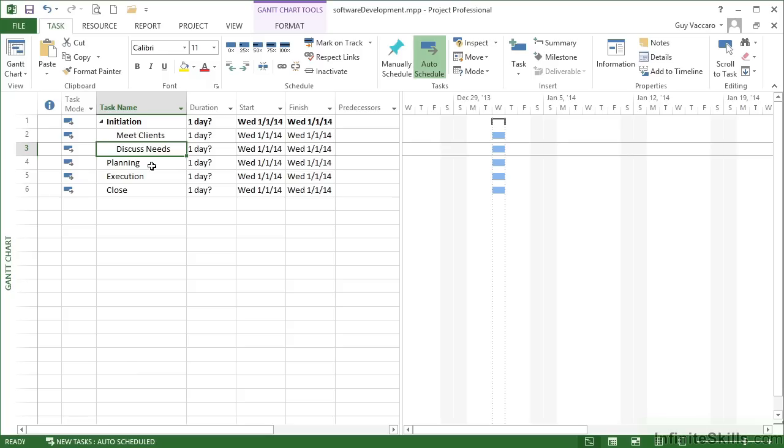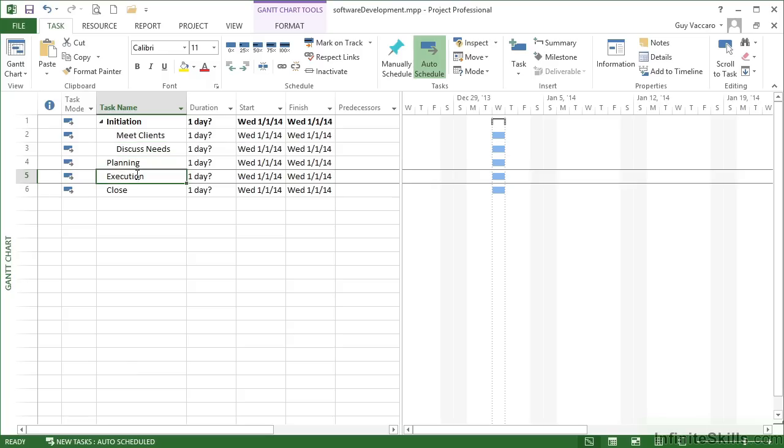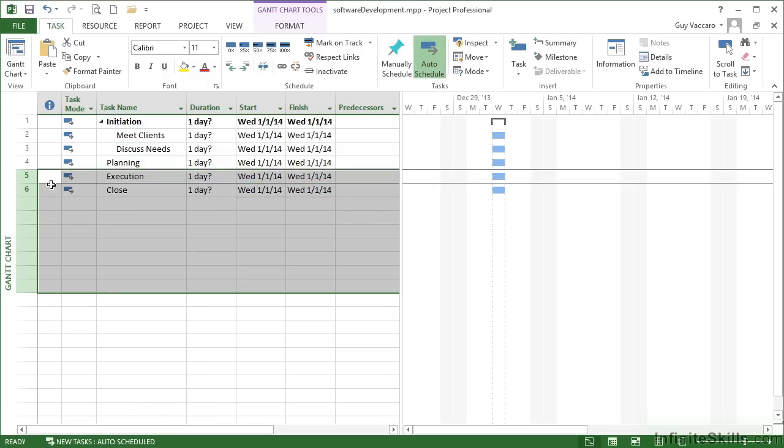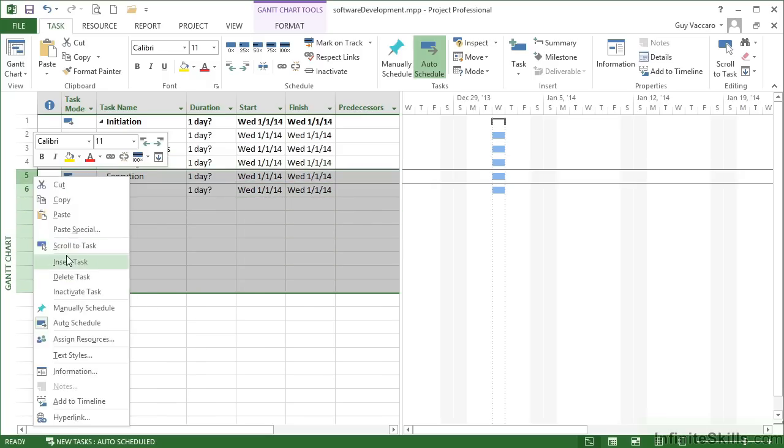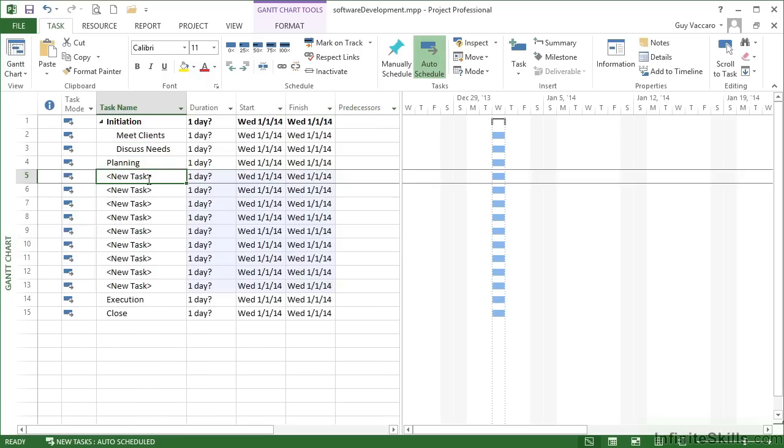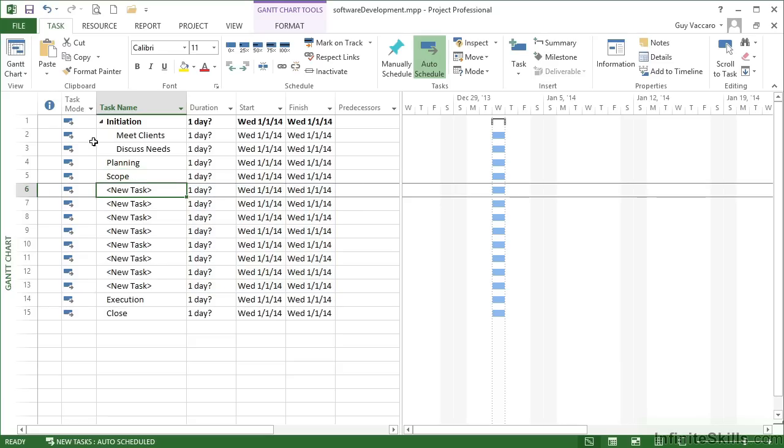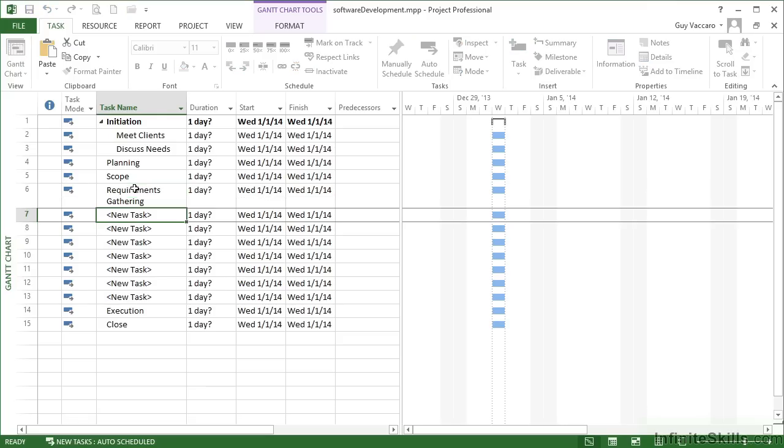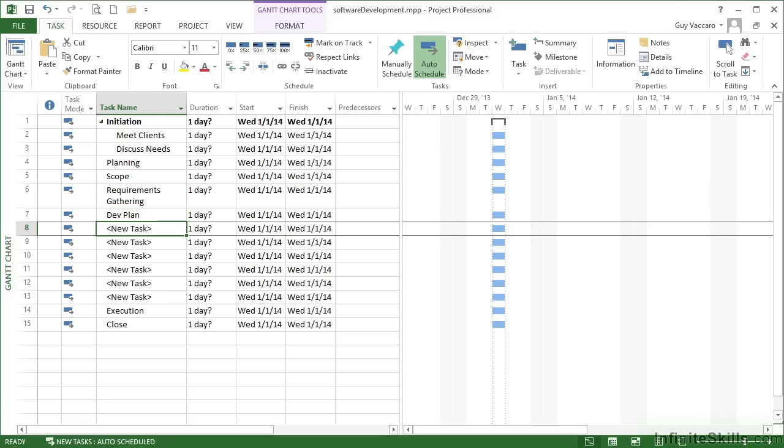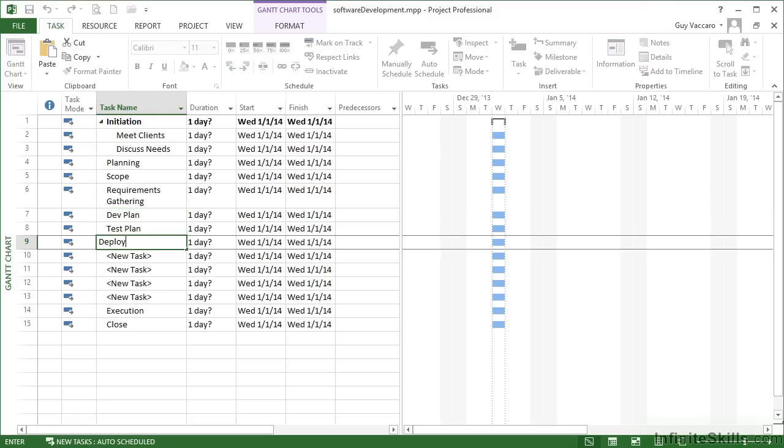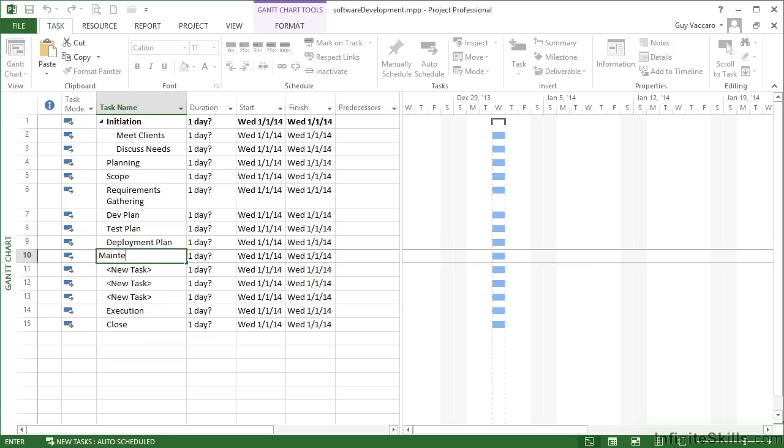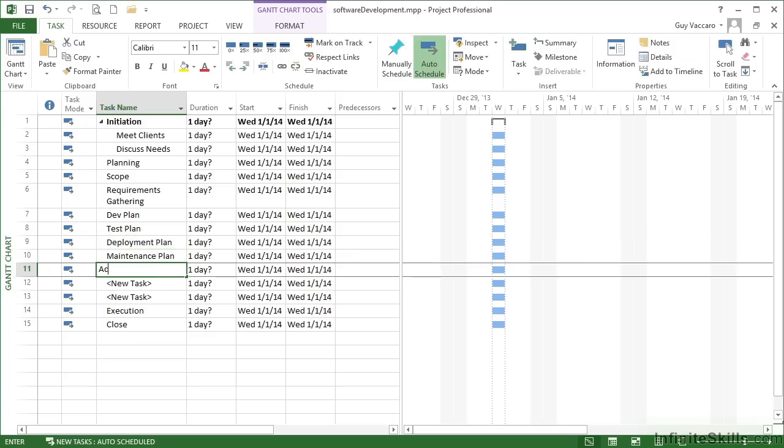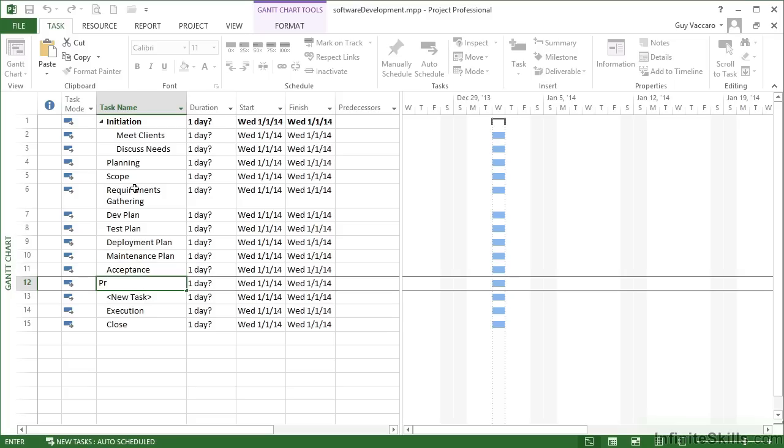What I need to do for planning is come below planning and insert enough tasks by highlighting a number of rows and inserting very much like Excel, and then entering each of the sections for the planning phase: scope, requirements gathering, dev plan, test plan, deployment plan, maintenance plan, acceptance.